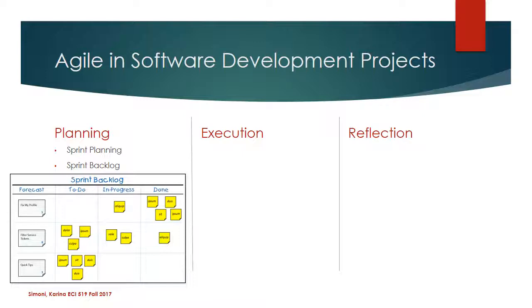So if we look at these rows as sprint 1, sprint 2, sprint 3, then we're going to say we need to do 5 things for sprint 1, and as we work on them throughout the sprint, we'll move them to the in progress so that everyone knows what is being worked on. And finally, when something is completed, we'll move it to the done column. So that way everyone knows what has been worked on, what is completed, and even what hasn't been worked on yet.